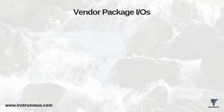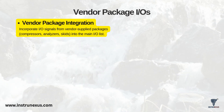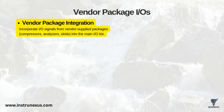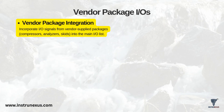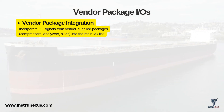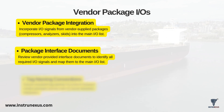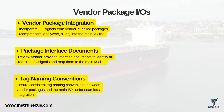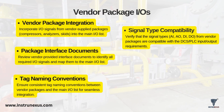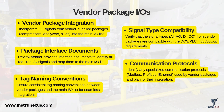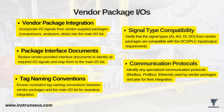One of the biggest challenges in a project is handling vendor package IOs. These are complex pieces of equipment, like compressors, analysers or skids, bought from a third-party vendor. These packages often come with their own small control systems. Your job is to integrate these black boxes into the main plant control system. This requires getting and reviewing the vendor's package interface documents to identify all IO signals they provide, ensuring tag naming conventions are consistent with your project, and verifying signal type compatibility. Often these packages use specialised communication protocols like Modbus or Profibus. The IO List must identify these protocols so a data communication link can be planned and integrated.